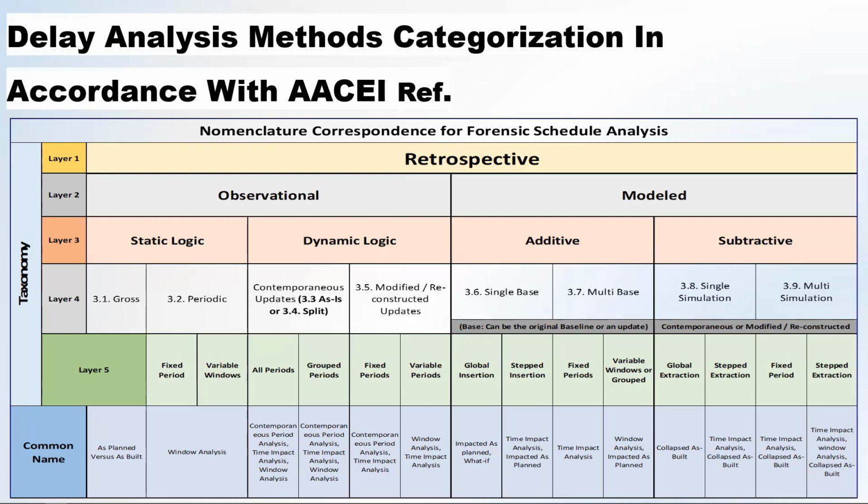This is my as-built schedule. For the subtractive, I will go and dissolve the event. I will just imagine that this event has not happened. So I'm going to dissolve the event, and I will see what will happen to the time for completion. This is a simple way of representing the subtractive mode under the model.